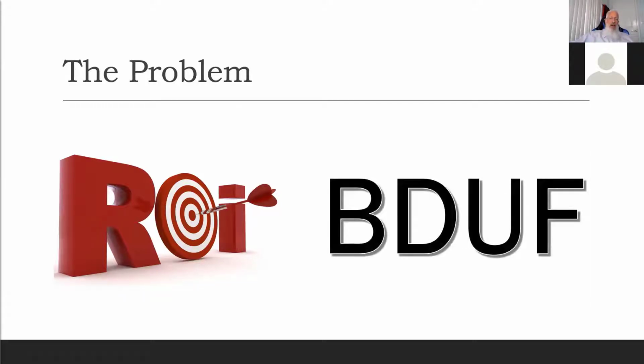Now, historically, the way we would answer the CEO's question is we would do BDUF, big design upfront. That's a waterfall process. So in order to tell the CEO how much this effort is going to cost, we would get agreement that this team would come together and do a lot of analysis to do the business requirements and do a lot of analysis perhaps to do preliminary design or even detailed design in order to come up with all the necessary information that we would cost out what it would cost to build a small city. And at that point, we tell the CEO, here's what it's going to cost based upon all this analysis that we did, a big design up front.